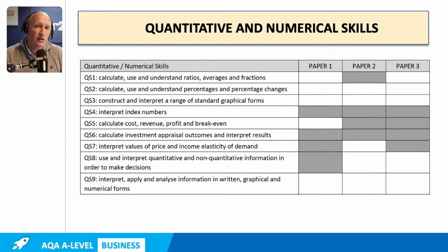So for example, network analysis is examinable this afternoon, and you won't be asked to complete a network diagram, but you could be asked, like we did last night, to interpret a completed network analysis and consider the implications of perhaps a delay in one of the activities. And the classic example is an activity that wasn't previously on the critical path that gets delayed, that therefore changes the duration of the project and the critical path.